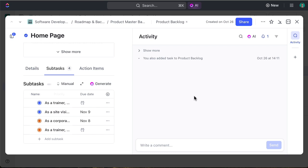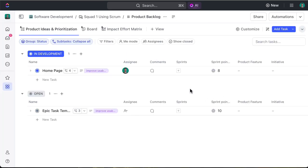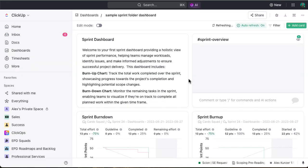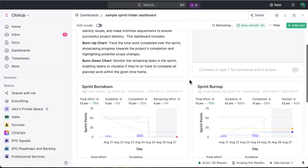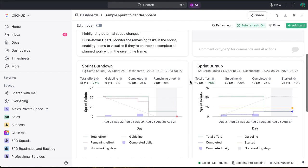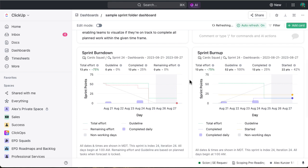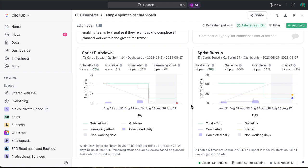Final piece for today's discussion is exploring the dashboards and reporting. Clicking out of this item and going into dashboards and reporting, there is now a facelift within the BI capabilities. You can now see that there is a sprint burn down and burn up chart that is very data rich. You can track total effort, remaining effort, what's completed daily, and the non-working days within a sprint. These are all very powerful pieces of information so you can track the trend of how your team completes work over that given sprint, given that the data hygiene is up to date.